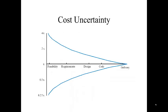The other thing is cost uncertainty. Early in the process you're going to be less certain as to what the cost is, but by the time you deliver the software you should pretty much know what the cost is. This graph from Somerville illustrates that the further along you go, the better bounds you have on what it is going to cost.